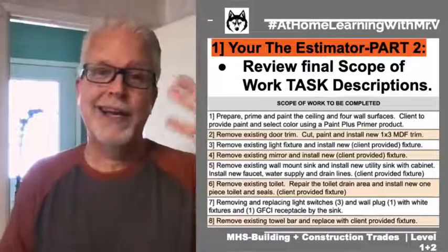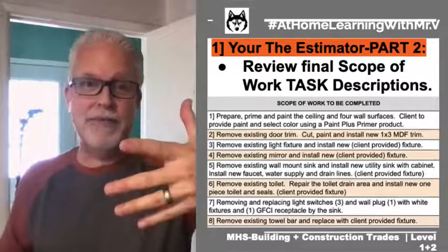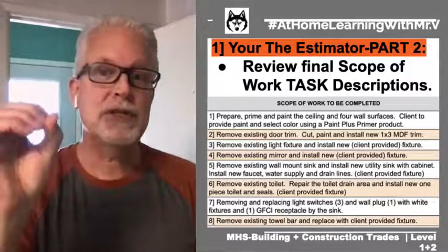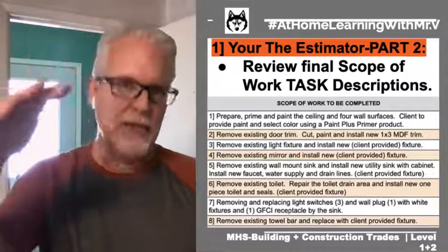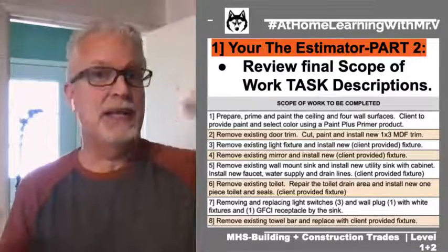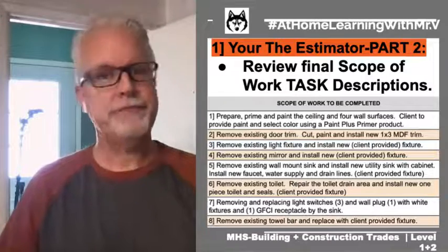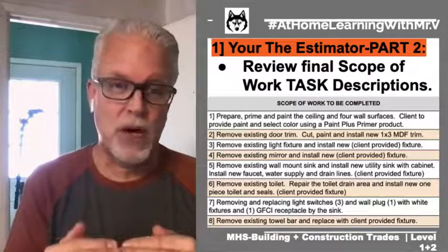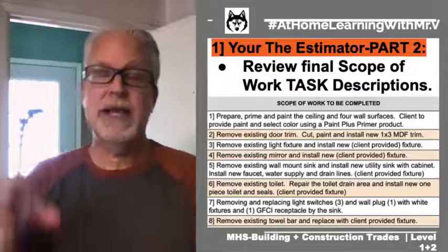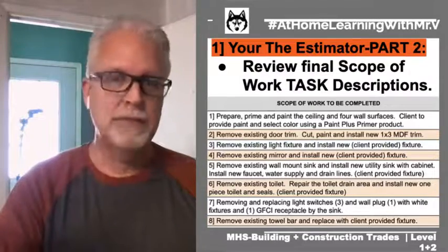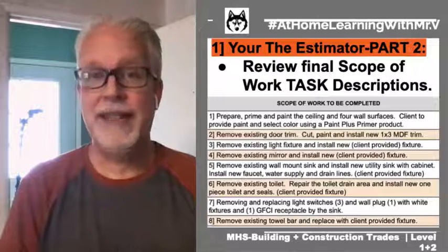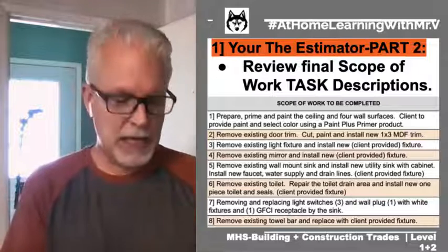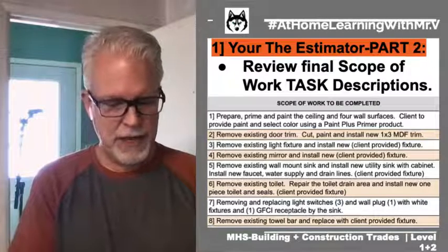There's 12 opportunities individually, so we'll do kind of 12 of the tasks, and then we'll have an overall winner because we're going to add it all up. If you said it takes 2 hours and 45 minutes for task 1, and then you go 2, 3, 4, 5, all the way to 12, we're going to add them all up, and this project should take X amount of hours. Well, that's the job of the estimator, because that bottom number is what the client wants to know about, because we go total hours times our bill rate equals, that's what we charge, that's what they signed off to pay. That's how it becomes so important for us. Okay, super cool. Let's do this. I'm gonna shuffle through a couple here, and let's go.